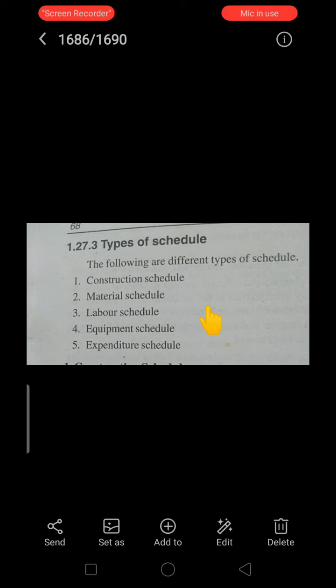For example, if we are constructing a single house, the first activity or first task will be cleaning of the site. To do the site cleaning we need time, resources in terms of manpower, and money. We will acquire the manpower and pay them. So cleaning up the site is a task which consumes resources in terms of time, cost and manpower. Such a task we call an activity.